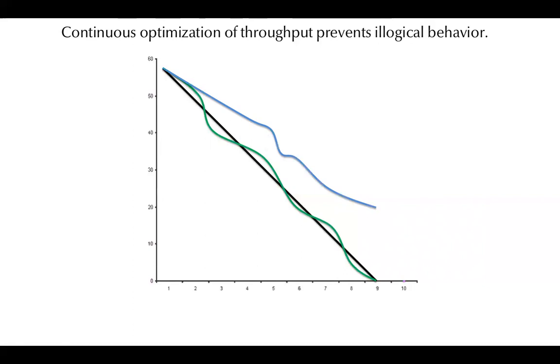That green curve, well, I don't think there are very many agilists who have ever seen one of those for real. They usually either the line is above or, sorry, the curve is either above or below the diagonal line. The diagonal line, if it's regarded as a commitment, becomes an excuse for heroics. So if we look at this blue line, you can see that someone has decided about 4.5 weeks in that we are in trouble. Maybe someone actually dared raise the status to amber. Maybe they did not. But we are in trouble.